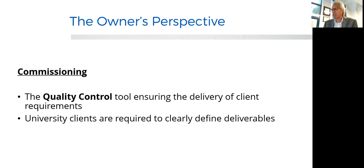The commissioning agent relationship is as definitive with respect to the success of the project as the person who builds. In fact, it's not uncommon for me to tell a commissioning agent that they are as accountable as the constructor, because they are the people who make sure that the constructor does what the design engineer wants them to do, what the OPR wants them to do, with the right product, with the right deliverable. So I don't have a problem holding a commissioning agent accountable in the same room as the constructor under the same conversation, because that's really where we are.